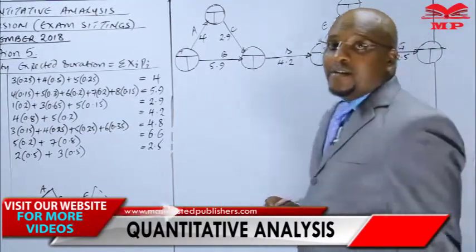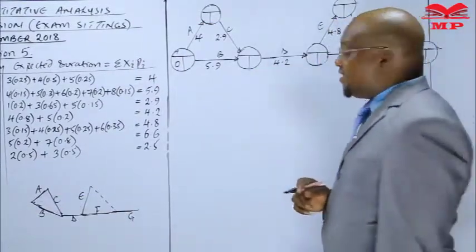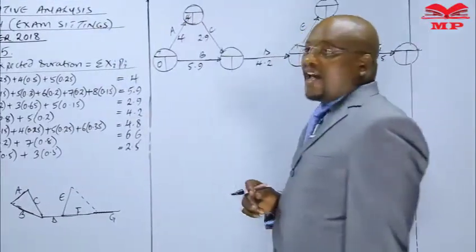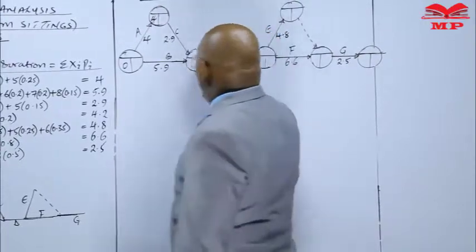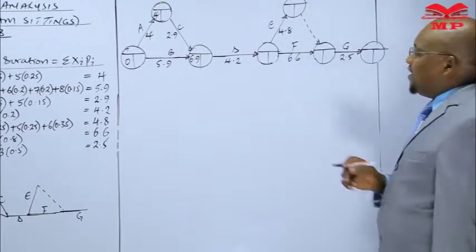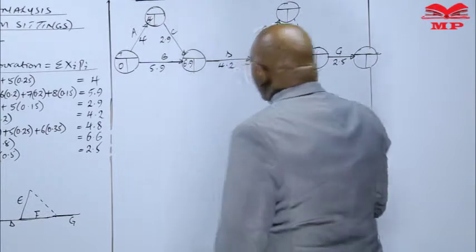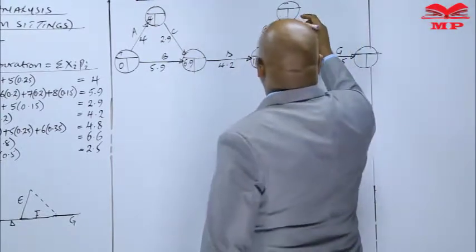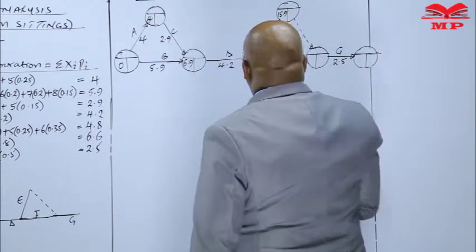So to get the earliest start time and earliest finish time, which is the earliest event time, it is 0. We add 4, this is 4. When you add 2.9, we get 6.9, while this one is 5.9. So we just take the 6.9 as our longest. Then we add this, this is going to give us 11.1. When you add 11.1, then up here it's going to give us 15.9.